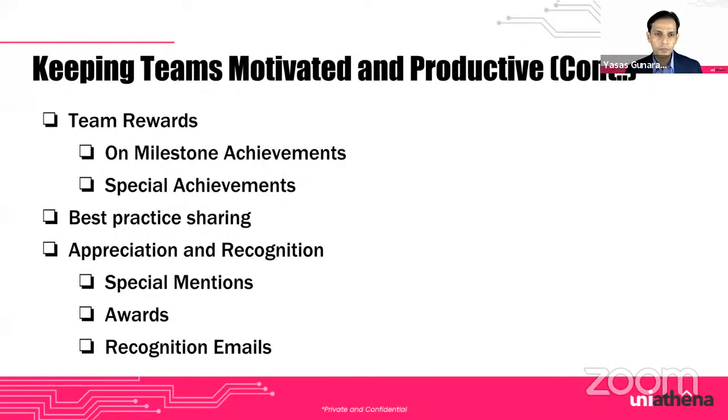You can have what we call a post-mortem document. You can share what we went wrong, where we went wrong, and how we overcame that. Or you can put in a best practice saying, okay, these are things we did and this is how we overcame it, and this is why it's a best practice. We should use it the same way the next time. You can share all the documentation on these tools.